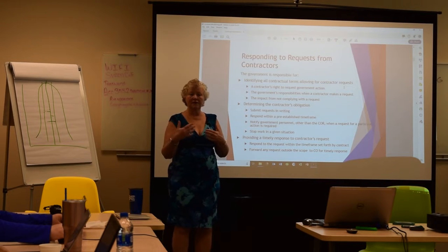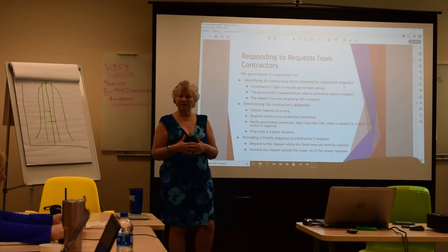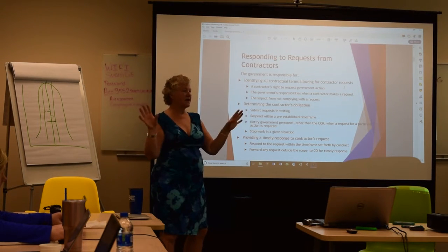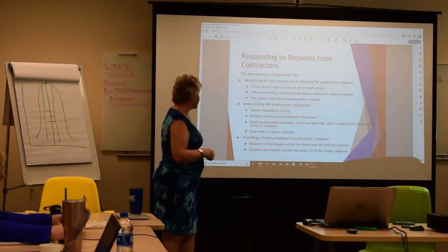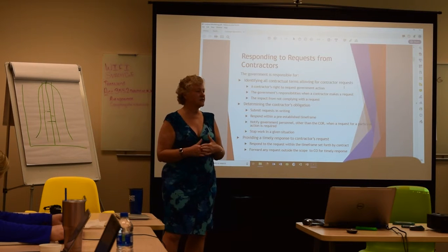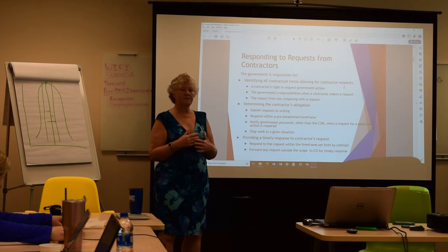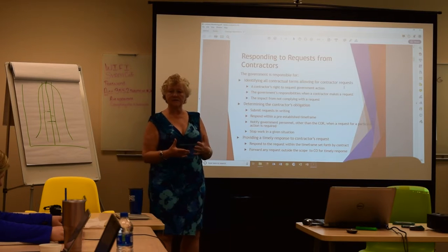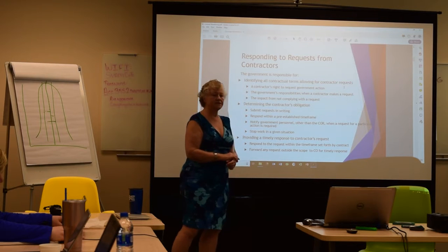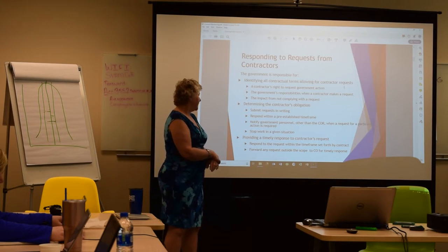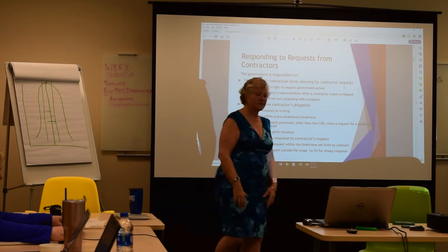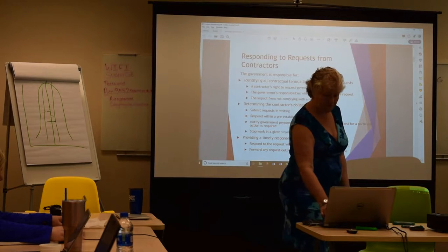And the government, the Corps probably can't answer that question. They would need to go back to the program shop and get answers. So they're supposed to be the outreach back into the rest of the government to get answers to your question. And they also have to determine when they should just tell you to stop work, because either the contract's not going according to specification or there's some issues, so they can recommend to the contracting officer to issue you a stop work order. So they provide timely requests as separated by the contract, and they forward anything else to the contracting officer for their review.